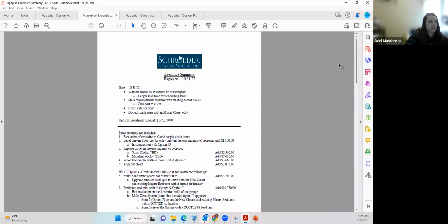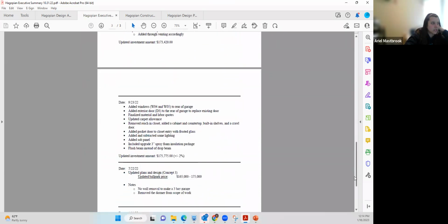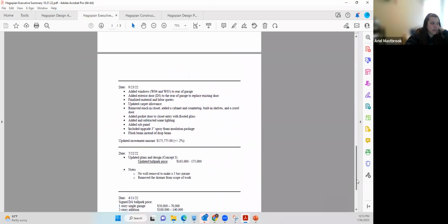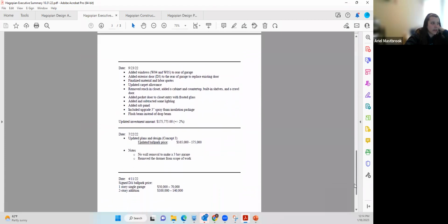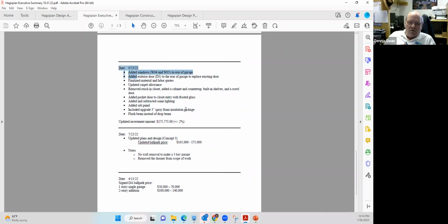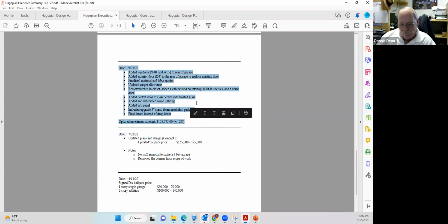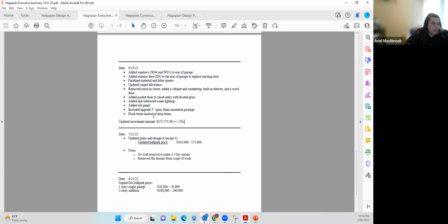So kind of the roles here for this document is the lead designer will put this original together. So this is like a working document, right? The lead designer will put the original together, which will generally look like this. After the design agreement and the design phase 2, we'll have an executive summary meeting with this. So they'll put all this in here.